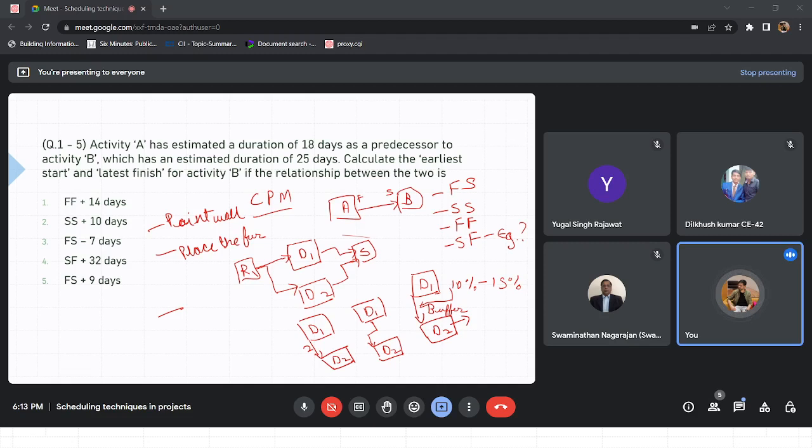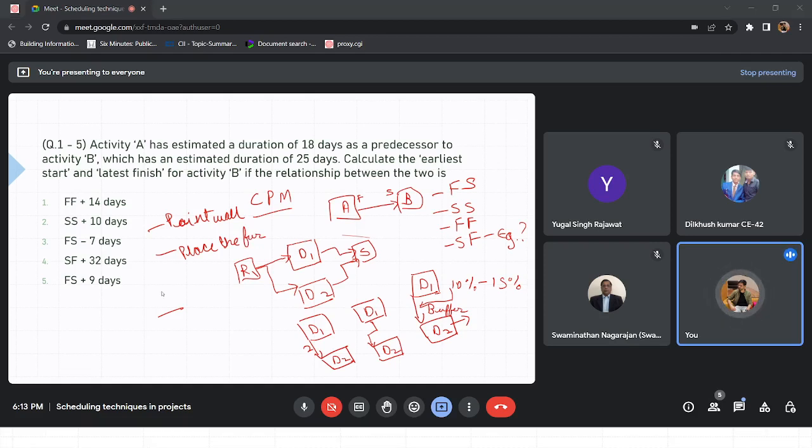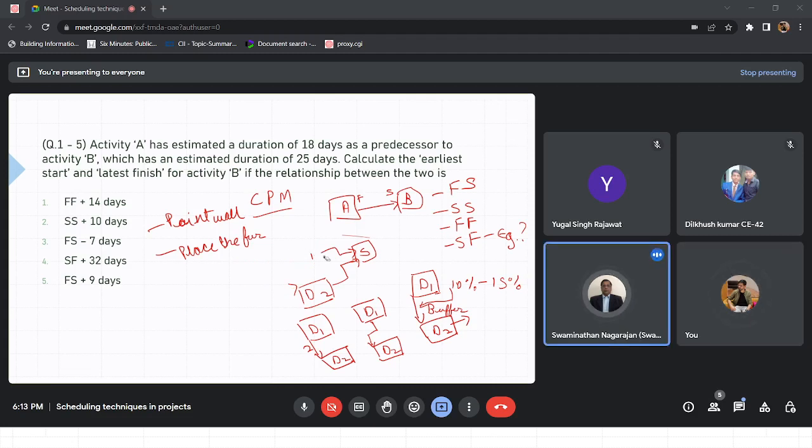Once the painting is started, you can start placing the furniture also. Similarly, once painting is completed, you can end the placing of the furniture also. Is this example quite what we were looking for? Yeah, I suppose.